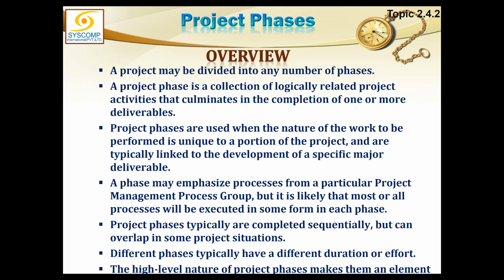Now when we are making an allowance that a phase can overlap the other phase, that essentially does not mean that 2 phases can be so parallel that they start together and end together. Not at all. If 2 phases are starting together and finishing together, they are not phases at all. They should not be called phases. Rather, these 2 streams of work should be joined into a single phase.